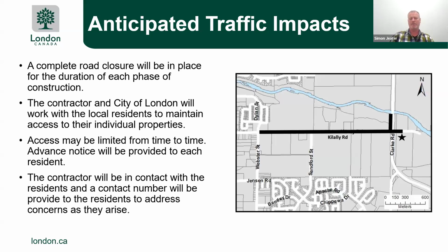And then the second year, it'll be a similar impact between Webster and Sanford. Along that section, there is only one home that's going to be impacted. So we'll work with that property owner to make sure they get access in and out. And during that period of time, Kilally Road would be opened back down to Clark.